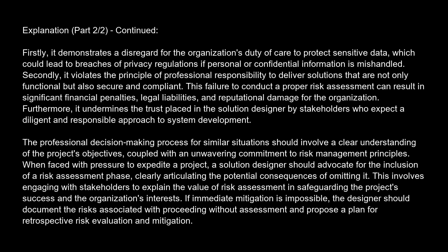When faced with pressure to expedite a project, a solution designer should advocate for the inclusion of a risk assessment phase, clearly articulating the potential consequences of omitting it. This involves engaging with stakeholders to explain the value of risk assessment in safeguarding the project's success and the organization's interests. If immediate mitigation is impossible, the designer should document the risks associated with proceeding without assessment and propose a plan for retrospective risk evaluation and mitigation.